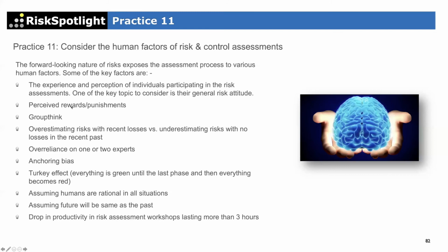Similarly, if there is a reward, so if a head of a business unit thinks he can get a higher budget if he overestimates certain risks for the business unit, then they may overestimate the likelihood and the impact of the risk so that they can get a bigger budget from the board. So you need to look at whether that gaming is happening in your risk assessment, depending on who is providing those responses.